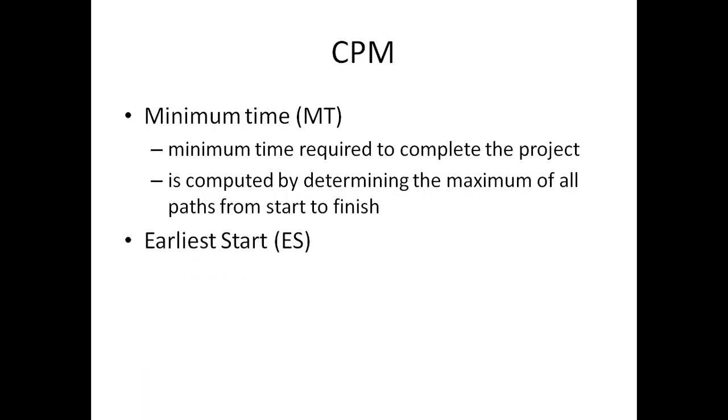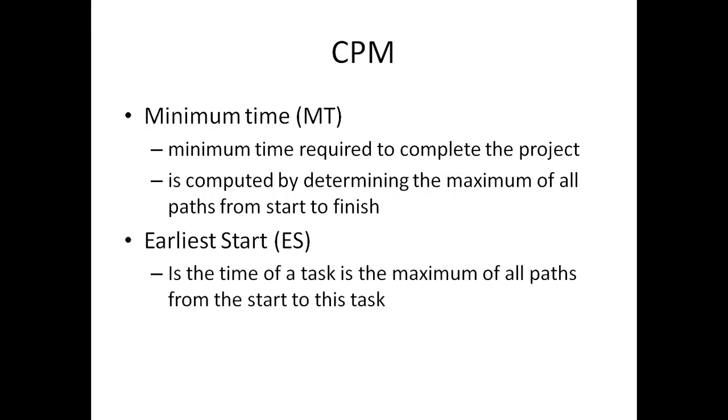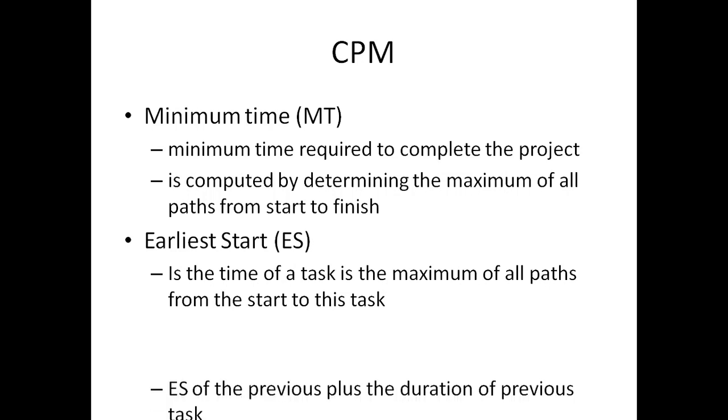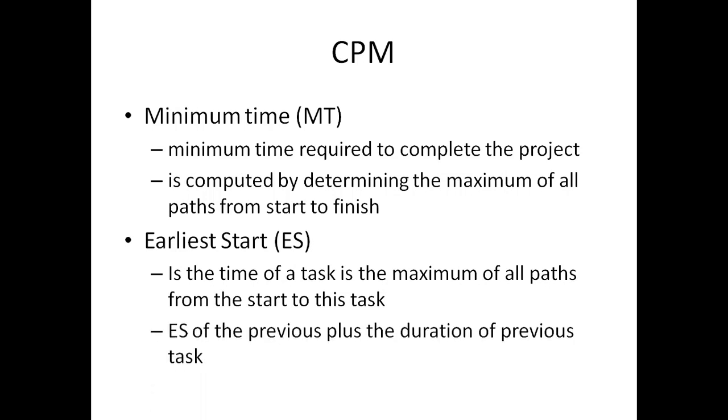Then there is the earliest start time. It is the maximum of all paths from the start to this task. The earliest start of the previous task plus the duration of the previous task also gives the earliest start time. So this can be calculated like this also.